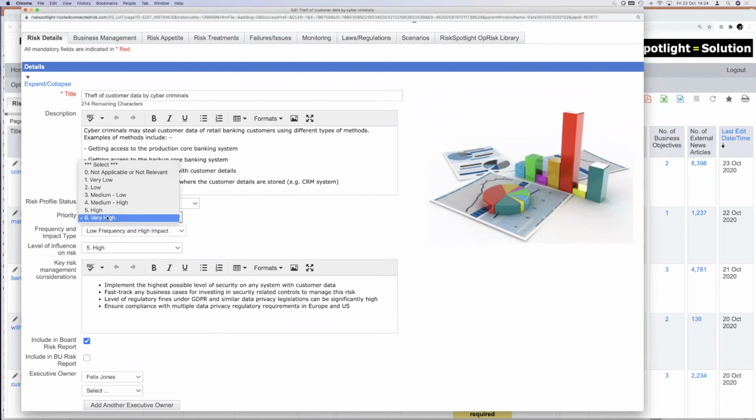And of course the risks where the inherent risk exposure is really high, you can flag them as very high, and risks with low exposure you can flag as low. But you don't have to do inherent likelihood, inherent financial impact, inherent reputational impact, because it's just the first line. They will not be able to think about a world without controls, and it just doesn't add any value. There's not a lot of reporting we do on that, because everybody is interested in the residual risk exposure. So if you want to use that for prioritization, create some sort of priority, and then you just do it once.